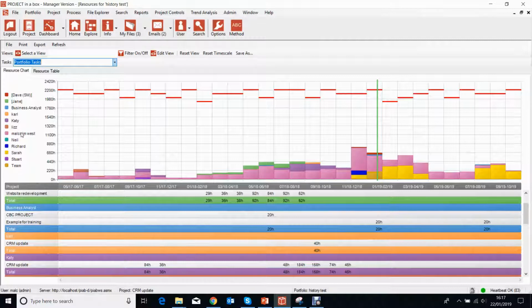So these things, once they're set up, they become pretty straightforward to use. They're pretty much automatic, and this is what we're looking out for, things like square brackets displaying against resource names. And then we can tidy those things up as we go. In fact, what becomes quite common is that plan templates are saved with pre-populated resource lists that are going to match the resource lookups in the system, so that you're always picking malc rather than m.west, which wasn't one that was on the list already. So that's picking those things up and pointing them through.